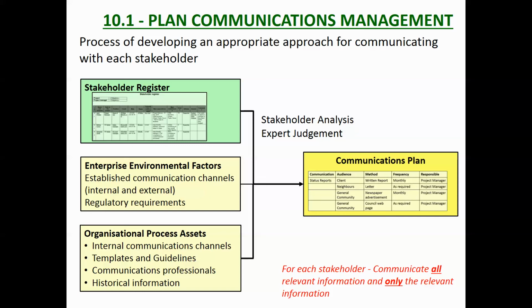Within our project team, who needs to know if, for example, we've changed the drawing, and how we're going to do that? It's no use the designers deciding that they're going to change a part of the design and not telling the construction team. It's no use the construction manager receiving the drawing if he doesn't give it to the guys on the ground. So those communications channels need to be established and formalised, so that when there is a change, that information happens. And I think every engineer would have a story about where the communication didn't happen and they went and built something off the old drawing and either had to rip it out or accept what was there.